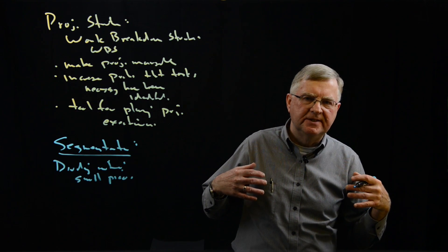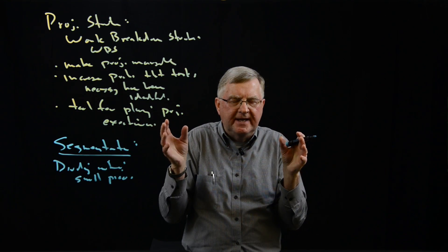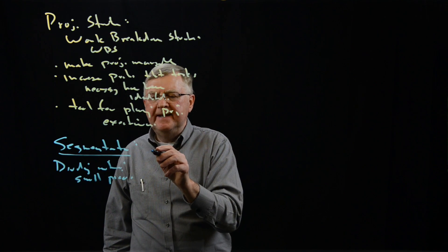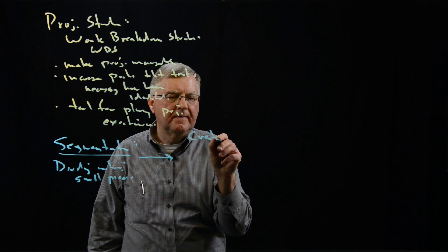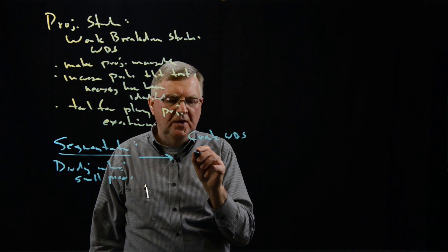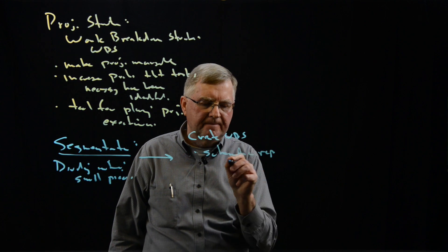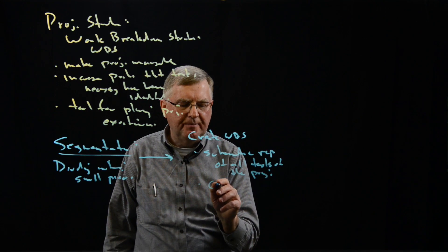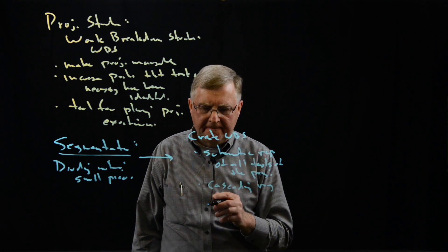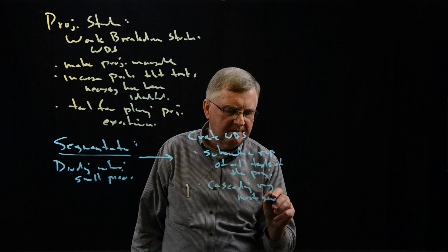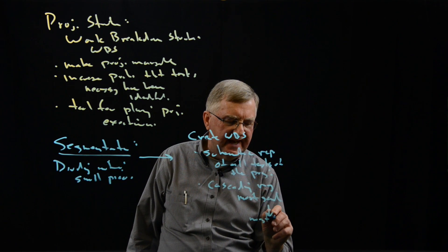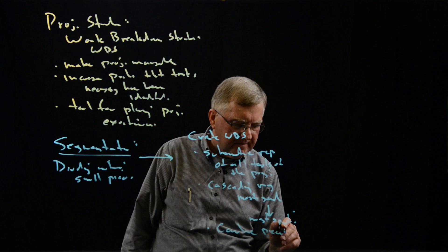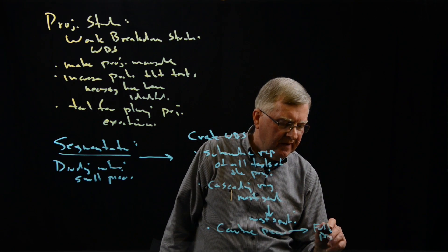This is something the project manager does — takes a look at the entire project, determines how to segment it, how to break it up into pieces, and then plans the pieces individually to gain information. We then take the pieces to create the Work Breakdown Structure, which is a schematic representation of all tasks of the project. It's a cascading representation starting from the most general downward to the most specific task. And when we combine all pieces, we end up with a view of the full project.